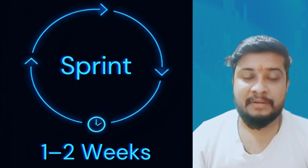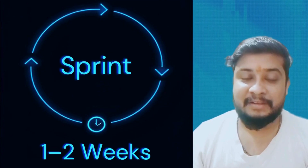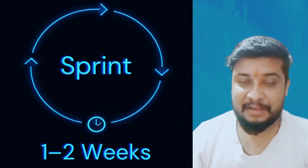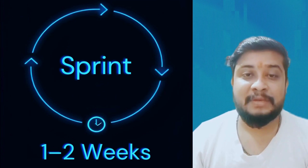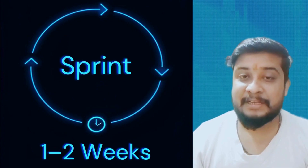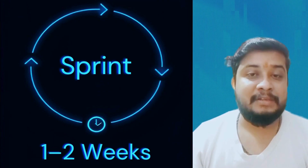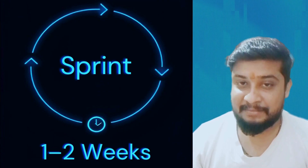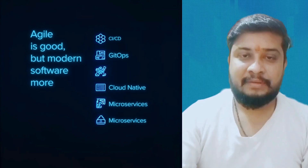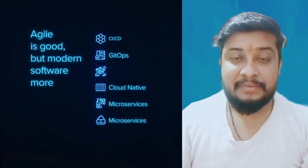Scrum makes Agile practical and organized. What exactly is a Sprint? In simple words, a Sprint is a one or two week time-boxed cycle — this is where the real work happens. Imagine you are building an application: in the next sprint you will create the login and sign-up. Every sprint delivers something working, and then the new sprint builds more. This makes development fast and incremental.